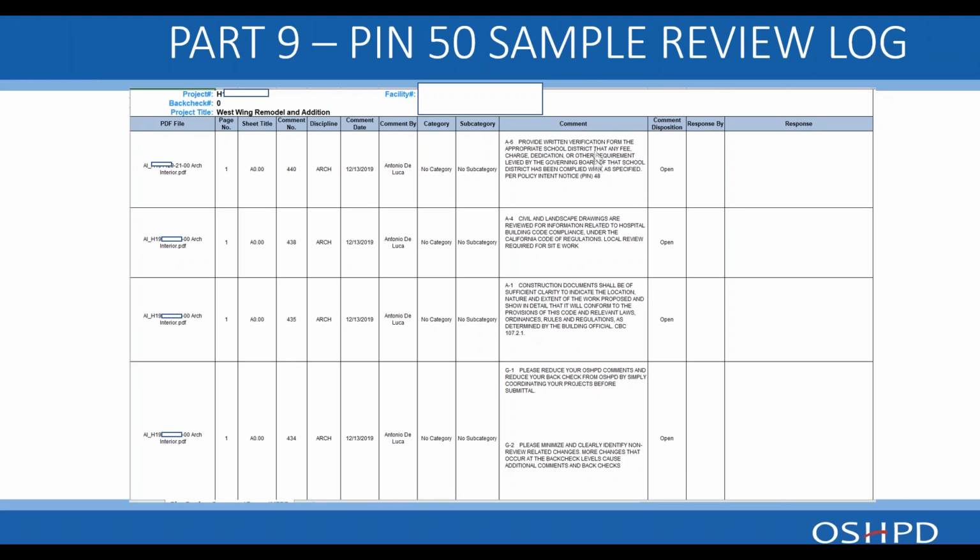And these are for collaborative review posted weekly, and for phased review, this is posted when the reviewer completes their review. It's available for industry to view. This is the responses that industry can put in and who did the response, and then once the reviewer reviews the comment and the response at back check, they will, if they agree, close the comment.